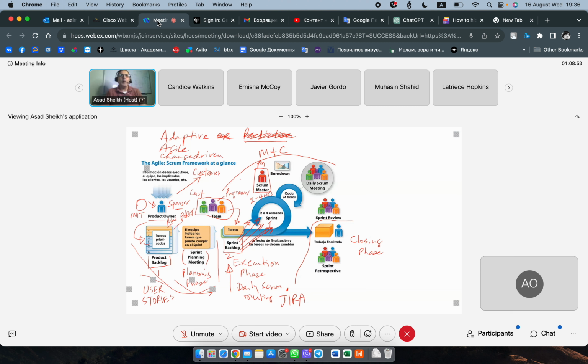So you were having one meeting per week. Now you're going to have a meeting on a Monday, and then you're going to have a meeting on a Friday. So the team members know that the PM is going to call a meeting on Friday or Thursday, whichever works, to find out what they have done, because we don't want the project to slip, right? If the schedule is slipping, you have to figure out now how. There are other ways that you will learn how you can catch up, but this is another way. And it's a good way, actually.